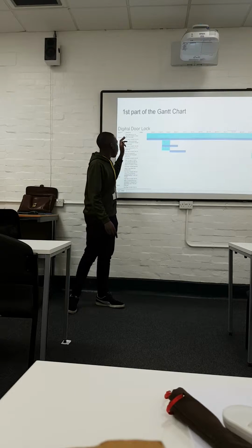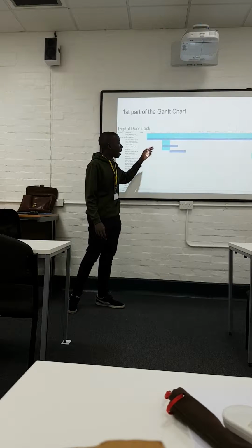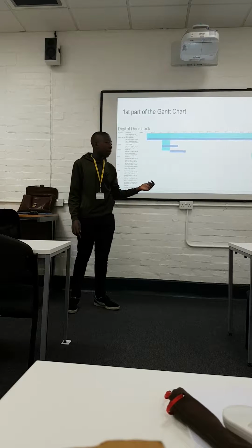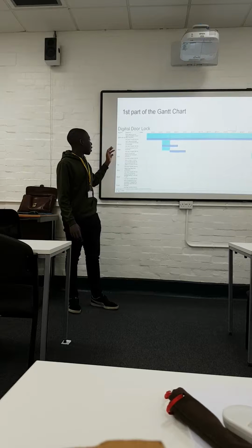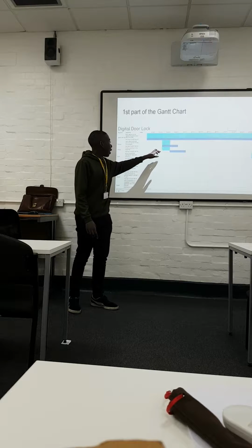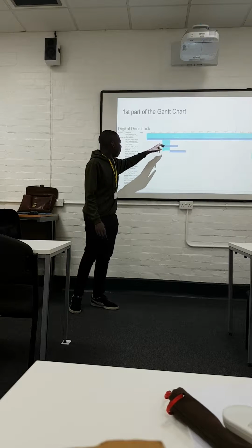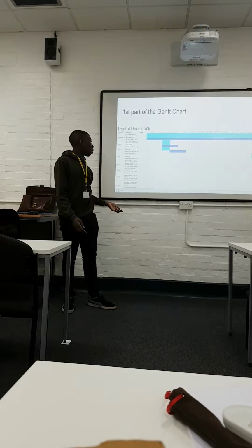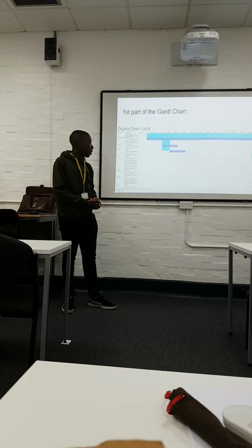Picking my 3 ideas took 1 week longer because I was undecided on what to pick. Then for the design, I planned the same time, but I spent 2 more weeks on that one, generally because I didn't like my designs.